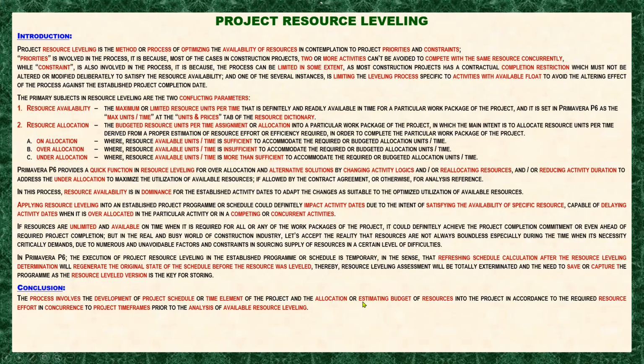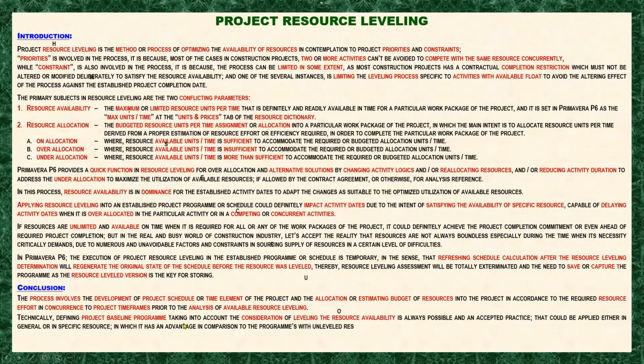Then you run the resource leveling when you want to see how the available resources you have affect the established dates. Okay, next. Technically, defining a project baseline program taking into account the leveling of resource availability is always possible and an accepted practice that could be applied either in general or to a specific resource.